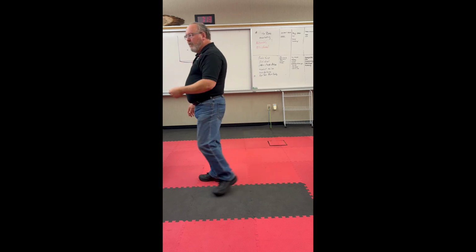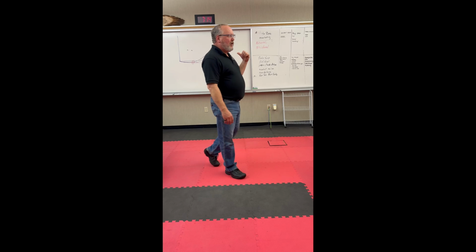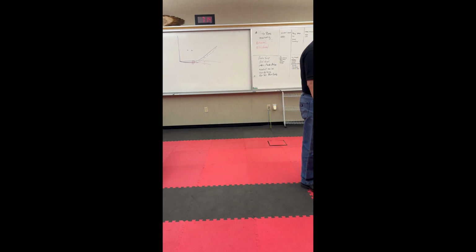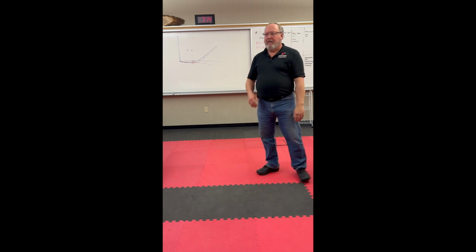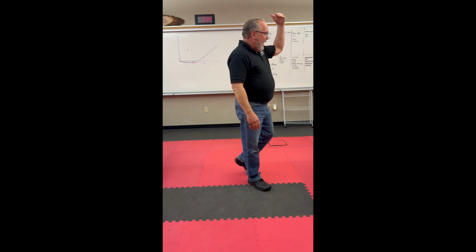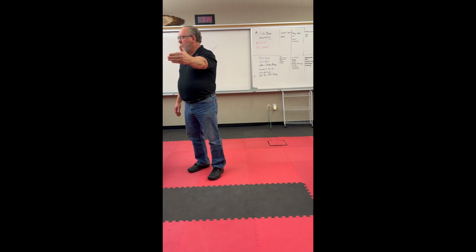You can look on the calendar that I gave you earlier this week. This is exactly when that pitch is. By that date, you have to be done. So now let's work backwards from that. That's how we start all these projects. That's what's being delivered to the customer. When I did military contracts, they said, it's due July 1st of 1995. That means, okay, that's when it's due. What do we have to get done by then? And then you start working backwards, creating a Gantt chart.